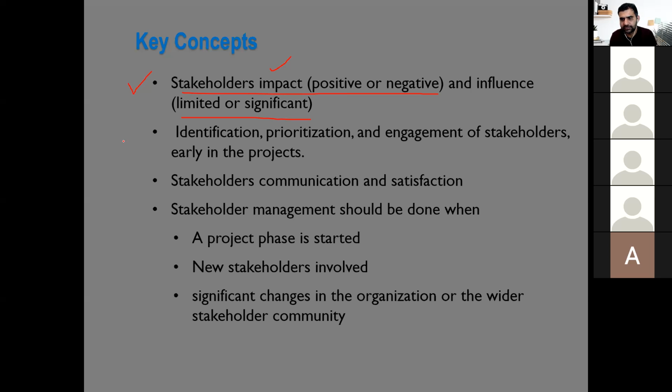Identification, prioritization, and engagement of stakeholders early in the project. So you have already seen how we can identify, what tools and techniques could be used, how we can prioritize the stakeholders, but we should do this as early as possible. In fact, if you remember the initiating process group, there were two processes in initiating. One was develop project charter and the second was identify stakeholders.